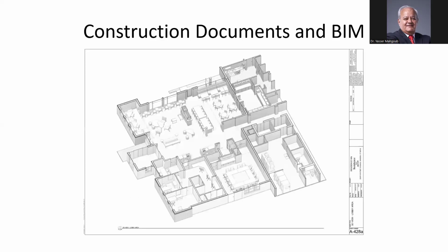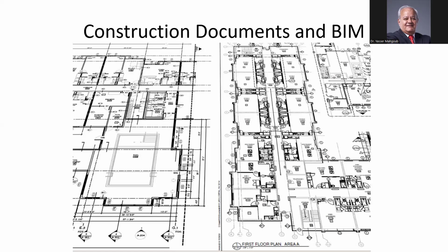But there are some tools now that are used for this in terms of BIM models that provide you with quantities and specifications for the materials that you put in the model. So when you finish, you can produce a document that has the specs for all the materials and the quantities. That's why it's very important that you follow the BIM procedures very carefully.